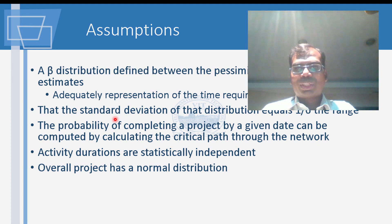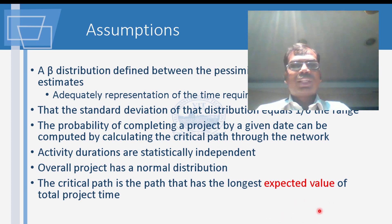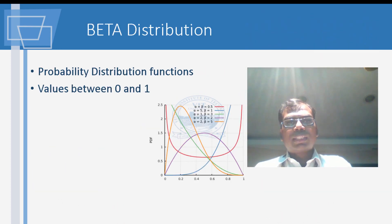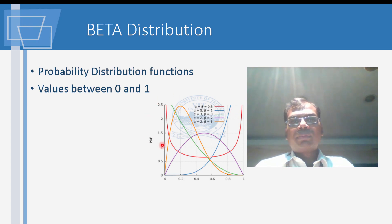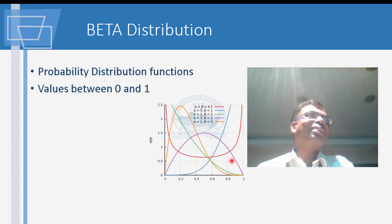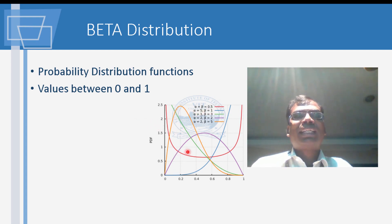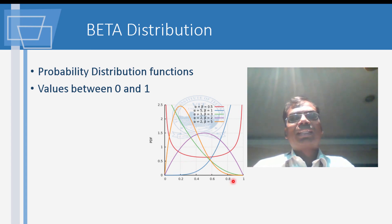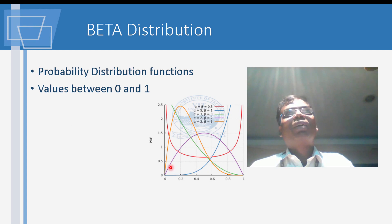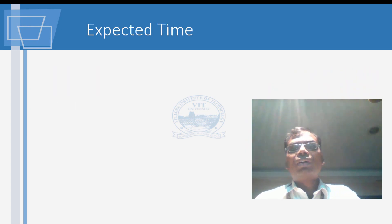The critical path is the longest expected value of total project time. Beta distributions can take various shapes between optimistic and pessimistic times, with values between zero and one. In practice, we just use the optimistic, most likely, and pessimistic times without interpreting the curves in detail. The expected time is a weighted average using the formula.